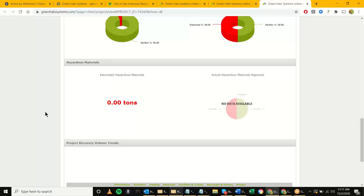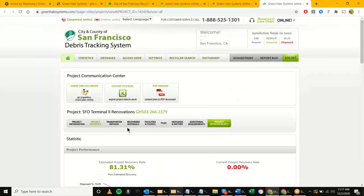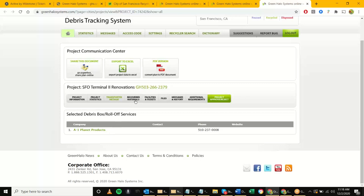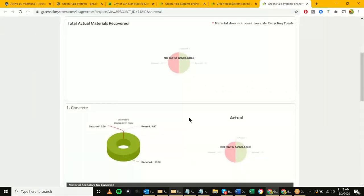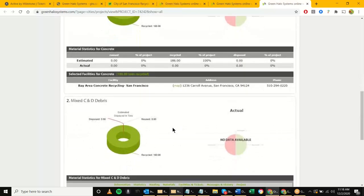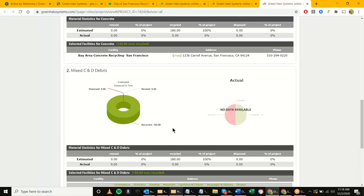At this point we've gone through project info, project stats, and transporter method. Most likely everything is standard. If the contractor chose their own hauler using 'add your own,' it would say 'User Added' in red next to the company name — so it stands out. In this case we went with one of the provided vendors. The next thing is going through recovered materials — this gives a breakdown of all the materials. At the very bottom there's a nice table giving a breakdown of everything — every material, every facility, and the tonnage.